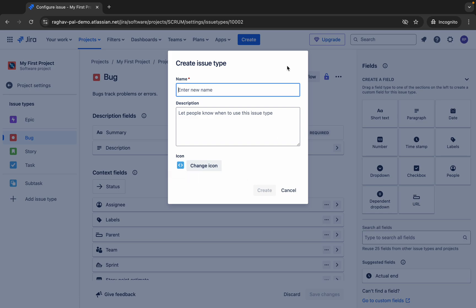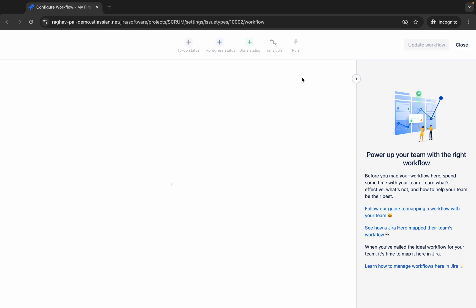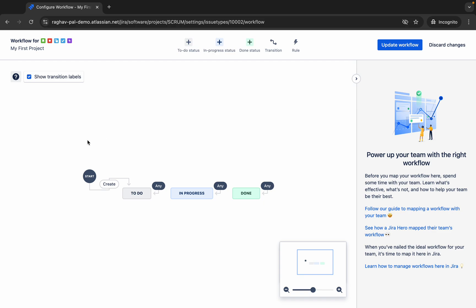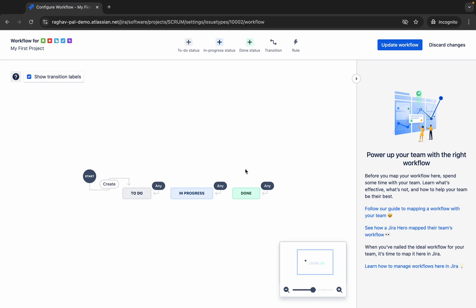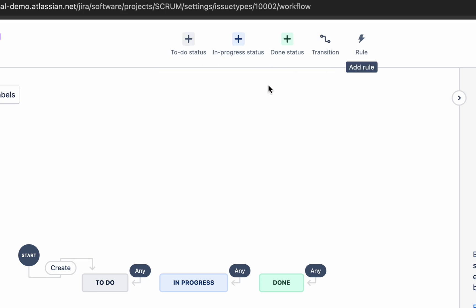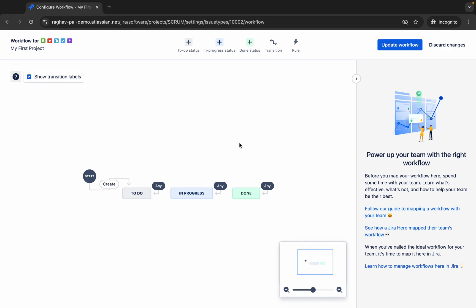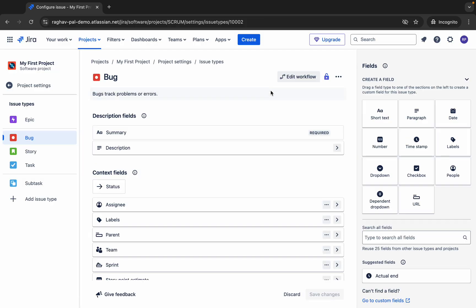We can also edit the workflow — how you want your issue to progress. From when you start the issue it goes to To Do status, then In Progress, and then Done. If you want to edit it or add more statuses, you can do that here to set up the workflow. As of now I will leave this and we will learn more about it in coming sessions.